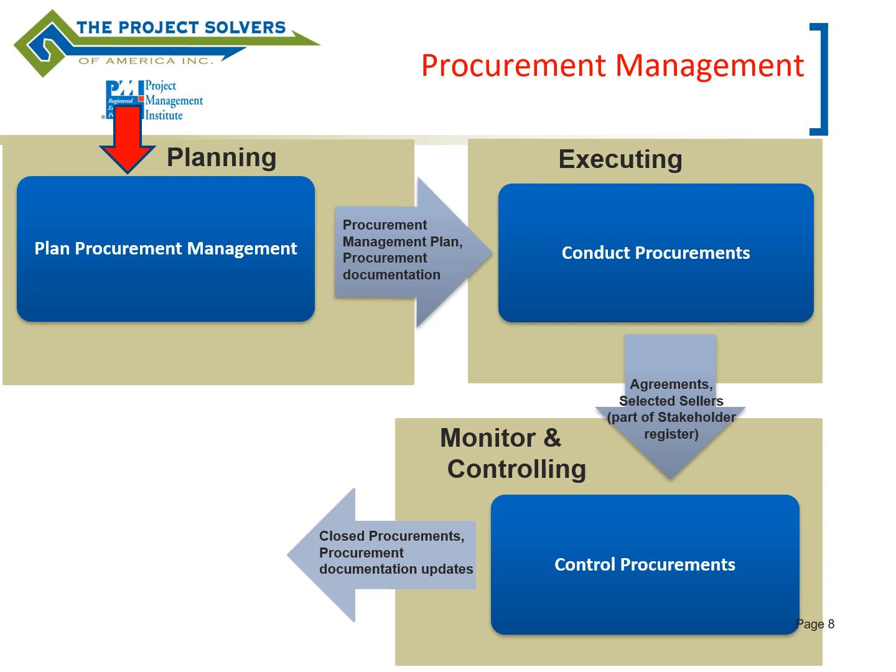Then the contract work begins, as I mentioned, and you're in the monitoring and controlling process group here. Control procurements is a control process like many of the other control processes in the PMBOK guide, where you're comparing plan against actual work results of the contractor. Ultimately, you're going to be closing the contract, archiving that contract in the contract file, and any other closing activities, accepting the work of the contractor, of course. So that's a high-level view of what occurs.